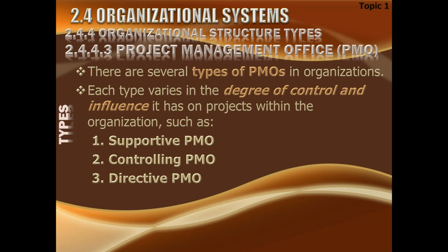Once these policies and procedures and trainings are over, the support function is over. Then the PMO may be mandated to ensure that all the policies and procedures which have been created are being implemented. So when you start implementing and enforcing the policies and procedures, you become a controlling PMO.